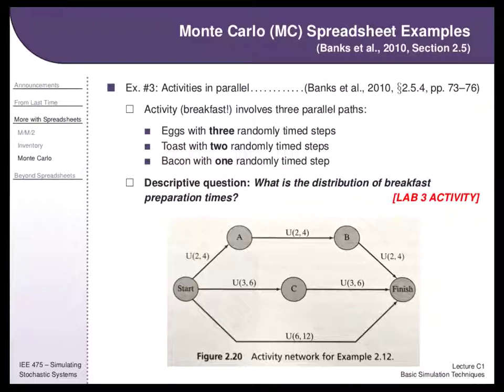And so if we're always focused on it, it's really hard to get to class early because everyone has to be early. Everyone has to get through their routine quickly. And in this case, it's difficult for us to have a lower than average total activity because that means that every branch would have to be lower than average. And that's just not going to happen very often. But if one of these is above average, it doesn't even matter what the other two are. And so that's why we're going to see a shift away from the average so that it'll be greater than average. And so that's why don't expect your duration.